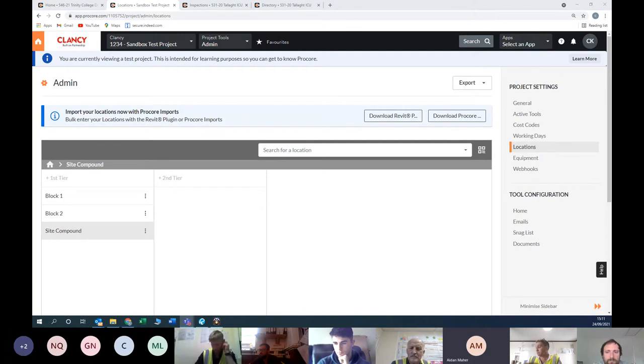and the carpenter fits it. Then he's using that same QR code to finish off the checklist, which is something probably not a lot of joinery manufacturers would do for us, but they're doing it for us on the project we're on. So it's something you could ask. It might be something to do going forward on a project that you might be on. It just saves all the hassle.